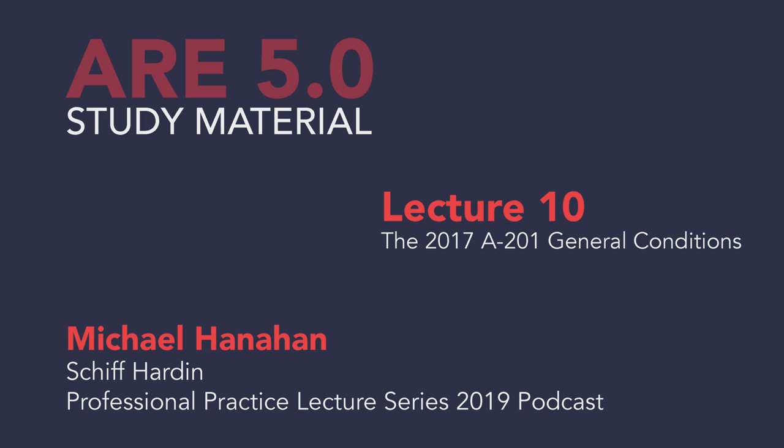And if we remember, we did the cost of the work. Remember, we were trying to figure out there was a term in the AIA B101, in Article 6, I think it's 6.3, that defines what the cost of the work is. And so when the owner's putting together its budget, I have $2 million to spend on this project. That doesn't mean that they can spend $2 million on construction if that's the overall budget, because they need to pay their architect and other things which are outside of the cost of the work. So this is a kind of an affirmation of what we saw in the B101. The work is simply the labor, materials, equipment, and services provided by the contractor.